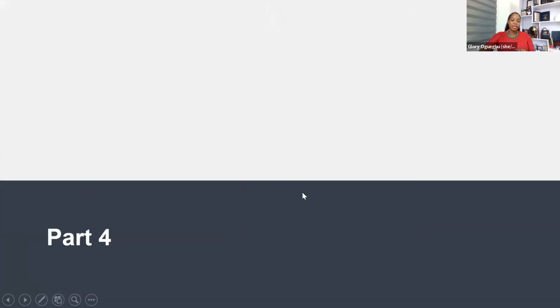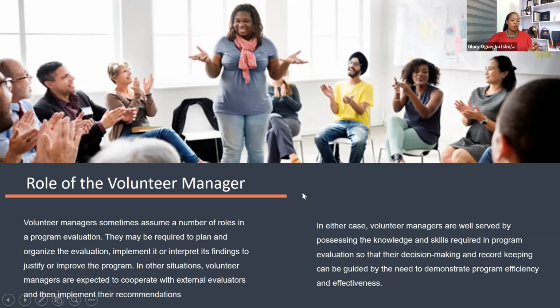So it's very, very important to keep that in mind, so that when you write down the deliverable, after that activity has been implemented, you have to check your deliverable and see if the very thing that you have achieved from performing that activity is in alignment with what you have planned for it to be. That way you can track your progress, tick your checklist, and be sure that you've met all the goals. This process is very valuable during your evaluation. It's like a guide to check that everything is well done.